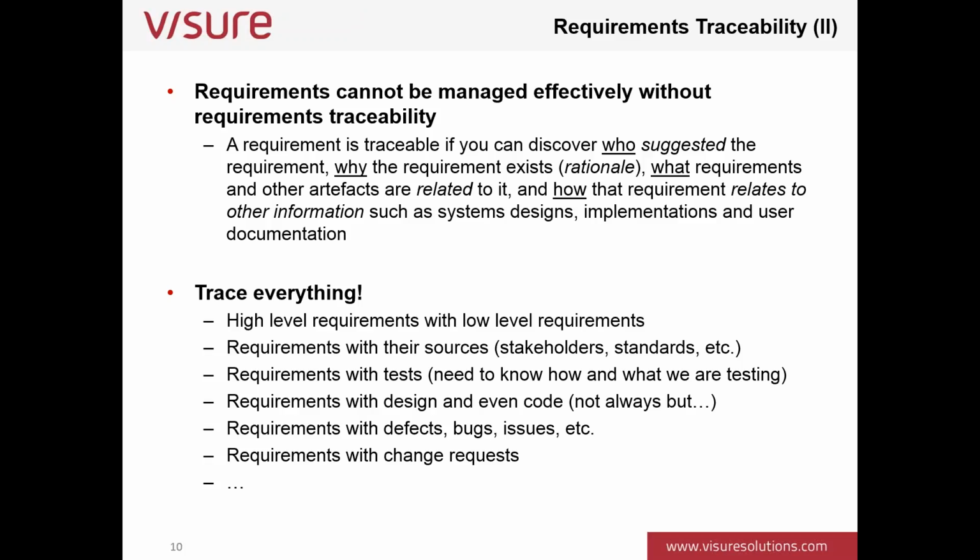So the important thing is that we have to trace the requirements with everything. We have to trace the high-level requirements with the low-level requirements. We have talked about user and system requirements, so we must keep them traced together. If we have several levels of requirements, business, user, system, subsystem, component requirements, and so on, all of those levels must be traced properly. We have to trace the requirement with its source, the stakeholder that asked for this requirement, the standard that is forcing us or making us implement this requirement.